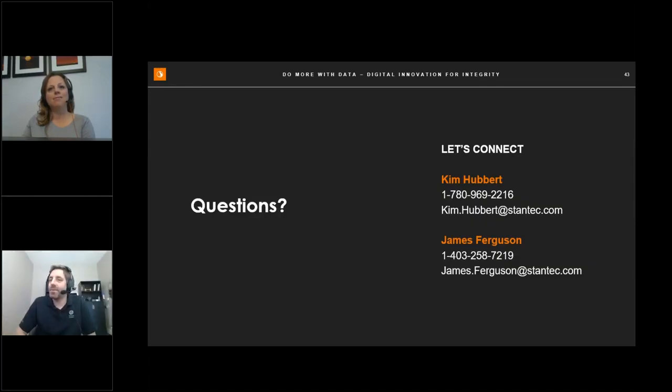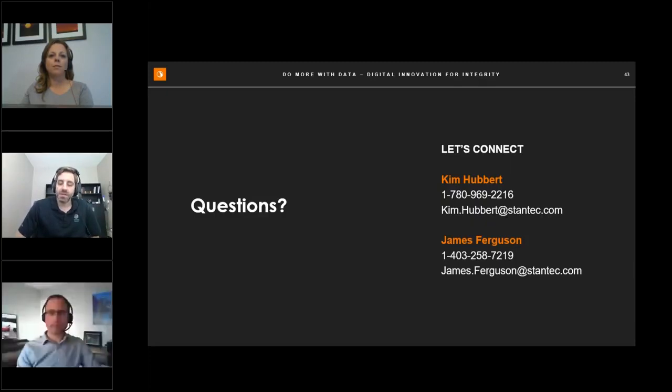I guess I'll jump in and take that one. So right now, the biggest way we're doing remote collaboration is, like I'd mentioned, using the scan data to reduce the number of field visits, using the scanned facility to help with the creation of isometrics for integrity purposes, and then using the scan data and the model data combined to do RFIs and to improve the RFI process. So you can actually start identifying and communicating on RFIs before you actually get to the field with a camera, for example. There's a lot of other use cases that we're looking at and developing, but those are the big hitters right now.